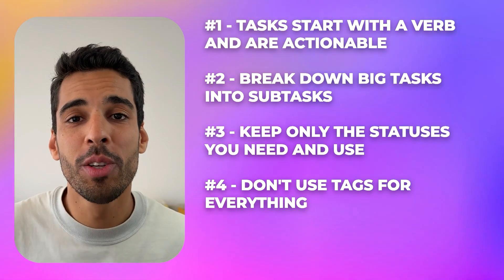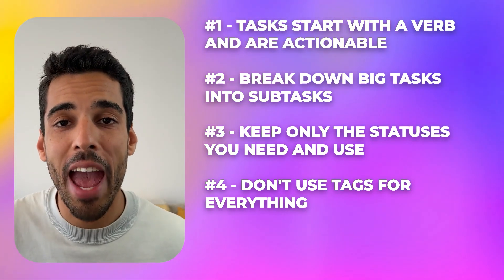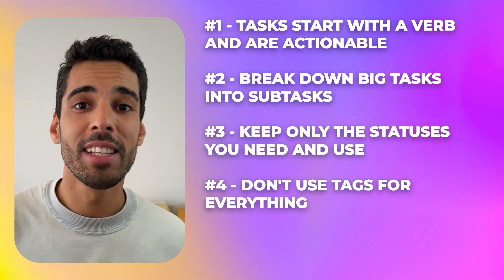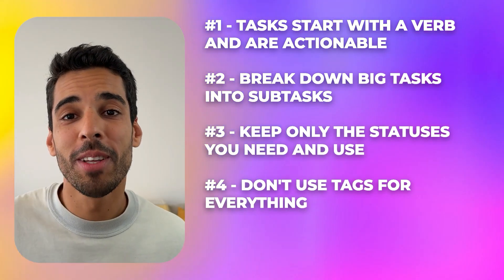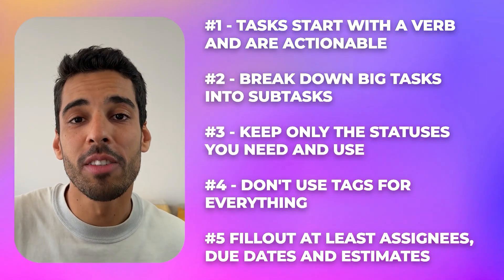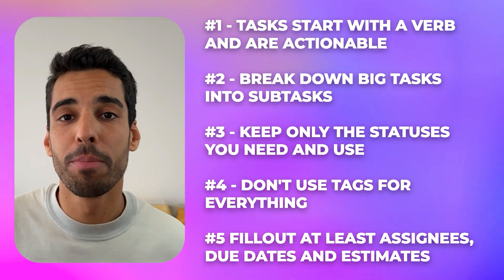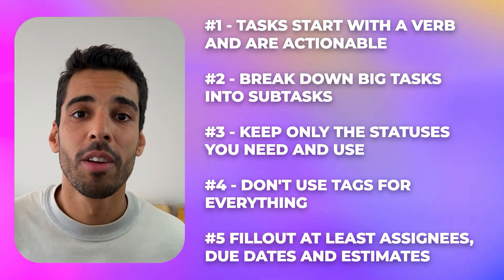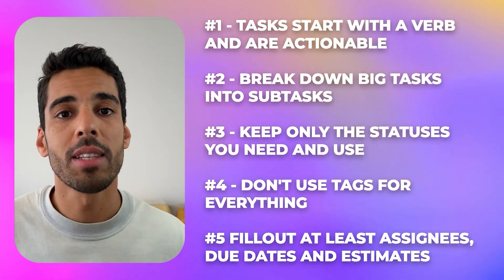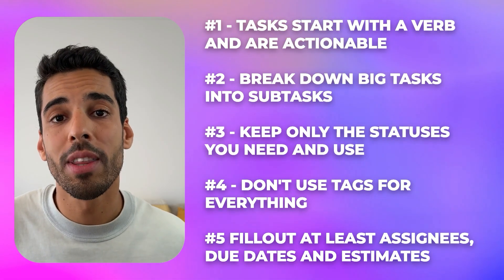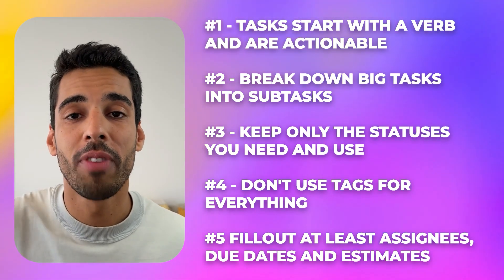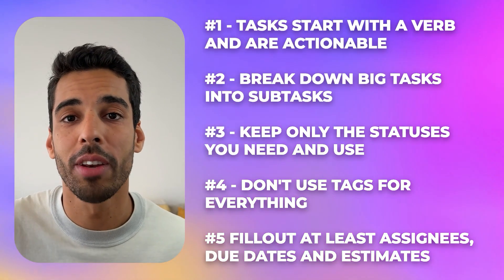Then tags — don't misuse them. I see teams tagging everything for any reason; they even tag the people assigned to the task instead of using the assignee field. That brings me to the last project management practice: fill out the task fields properly. ClickUp has built-in and custom fields for a reason, so get in the habit of filling in at least the time estimate, the start and end dates, and of course the assigned people. Creating this habit is very useful when you start using advanced features like capacity planning or dashboards.